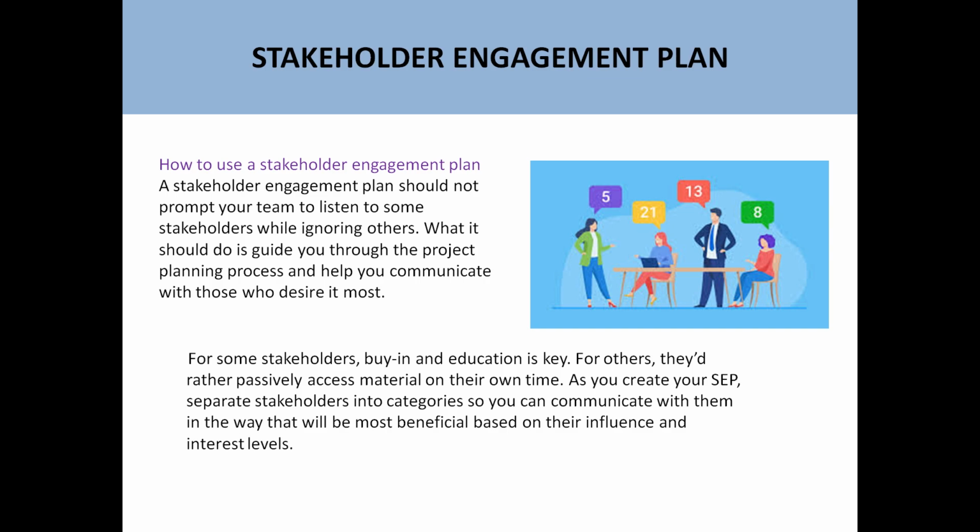Basically, for some stakeholders, buy-in and education is the key. For example, a CTO on the customer side is very important. Whatever he is saying, his opinion, his agreement, his consensus is very important. For some stakeholders, only communication is important. For example, they only need the status of the progress of the project.